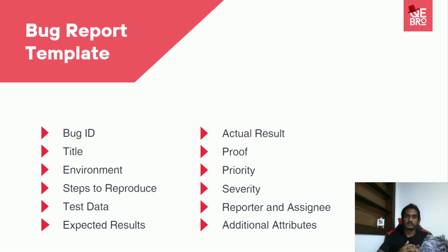The priority maybe they can change. The severity depends on the feature or the actual impact. Then the management might decide to fix only the high priority ones with this release, and leave the low priority ones for later. That's why priority and severity are important.